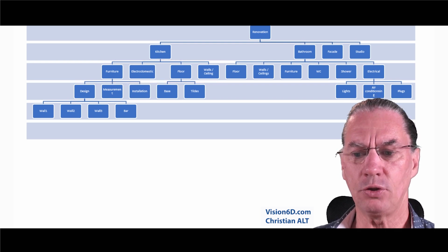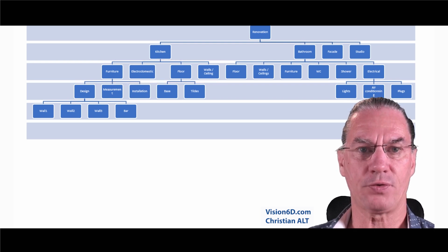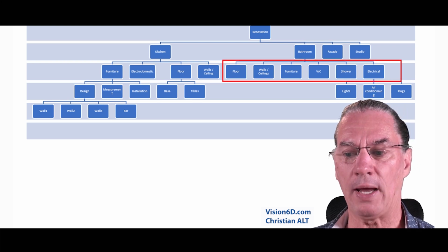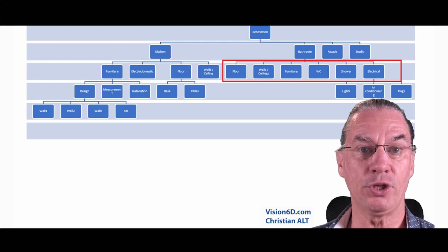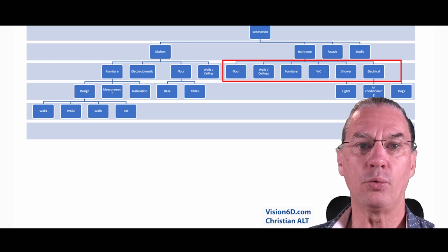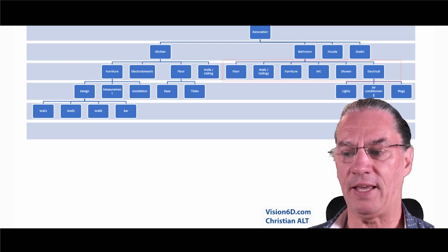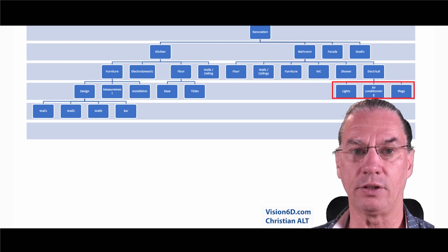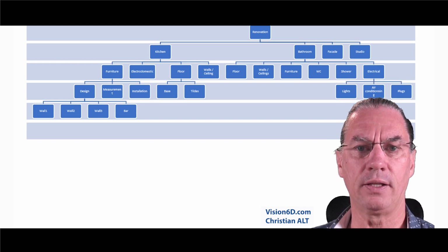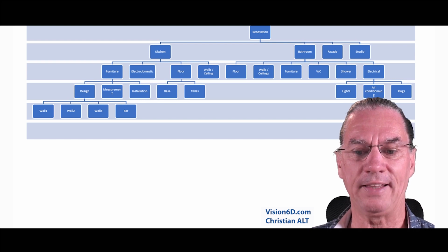The same thing, you will find them for the bathroom. We will also need to do the floor, then the walls around, and then decide for furniture and the water closet and the shower. And there will be electrical components in there like lights, air conditioner, and the plugs. You see that the decomposition of the bathroom was done in that way.